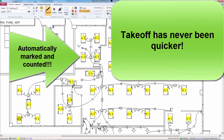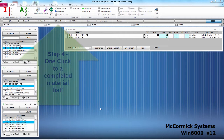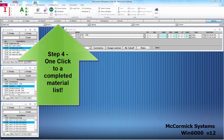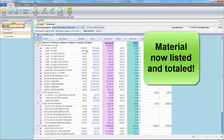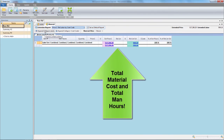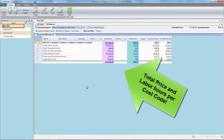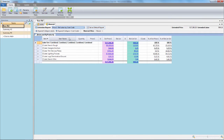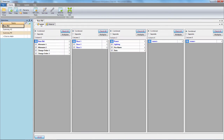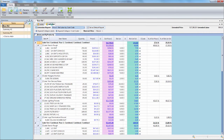There has never been a smarter way to do takeoff. After takeoff is complete, Instant Extension will show you your completed material list in one button click. Simply click on the Step 4 Extend button to see your full material list complete with quantities, material cost, and labor hours. You can collapse everything to just see your totals — total cost and total labor hours. Another way to view your material is by cost code. Click on the Collapse Cost Code button to view each cost code total. In addition, you can instantly break out by labels, giving you the detail and totals of your customizable breakouts.